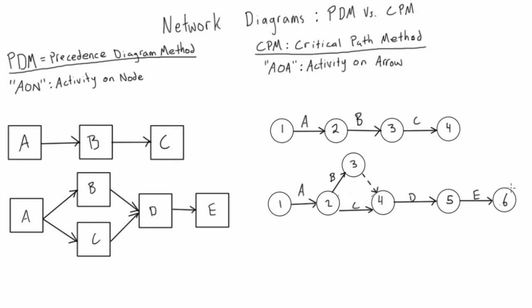When drawing CPM network diagrams, one of the rules is to minimize the use of dummies. In harder, more complex examples you might draw your diagram and then look at it and realize you can reduce the number of dummies and draw it more efficiently. So one of the goals is to use the least number of dummies possible, and also to minimize unnecessary crossovers — for whoever is using the diagram, you want the least amount of arrows crossing over each other.